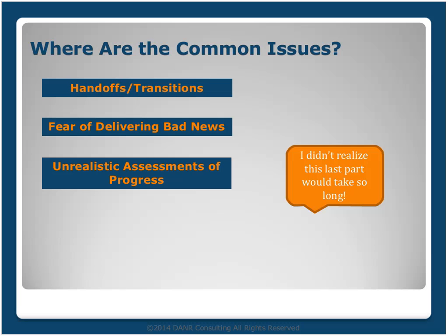And so how do you get around that? Well, one way is to get another set of eyes on it. And that may be a QA/QC reviewer. It may be a technical lead or design coordinator that has the responsibility of kind of validating progress. But you want to be making sure that the progress that's being reported is actually being made.